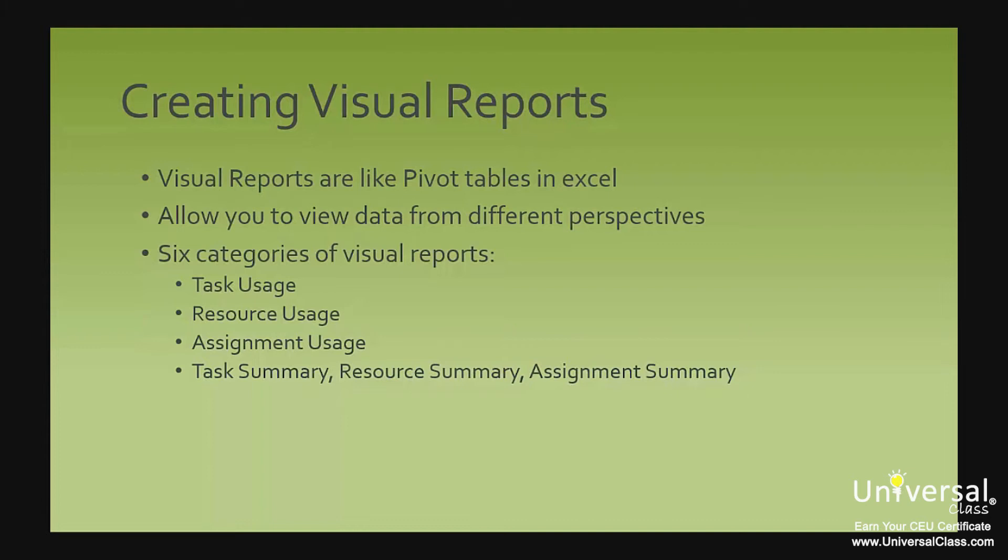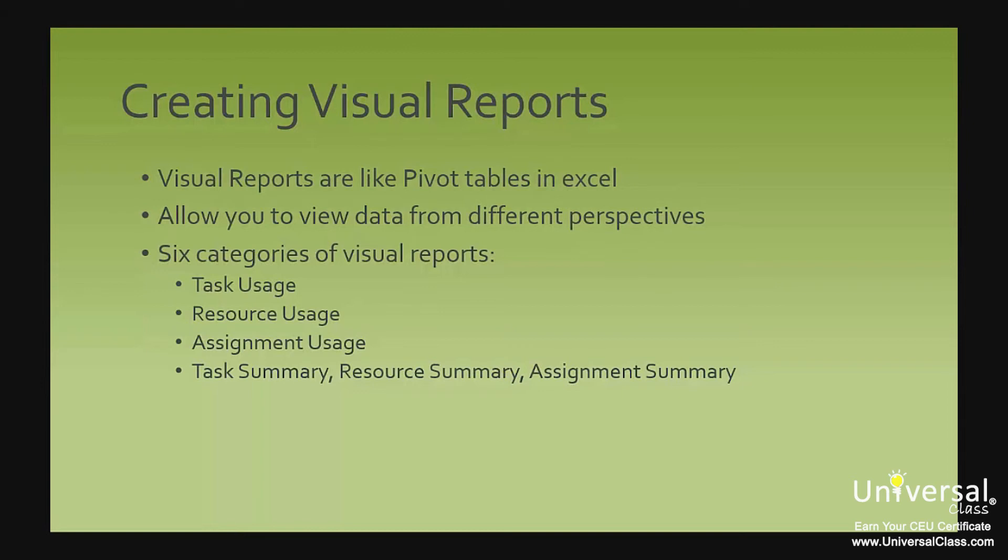These categories are: task usage. This is based on time-phased data for tasks and shows you cash flow and earned value over time. Resource usage. This is based on time-phased resource data and shows you resource availability, costs and work data. Assignment usage. This is also time-phased data that shows baseline versus actual costs and baseline versus actual work. Task summary, resource summary and assignment summary. These provide diagram views of work and cost data. They are not time-phased.